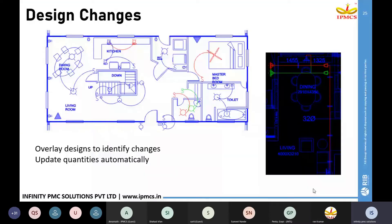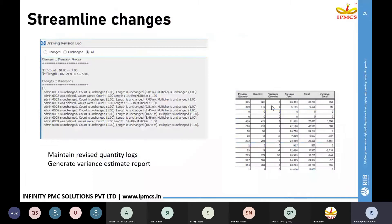You can compare your drawings by overlaying an older drawing onto the newer drawing. You will see a blue line, red line and green line. Green indicates newly added elements. Red indicates deleted elements compared to the older drawing. Blue indicates lines or elements that remain unchanged in both drawings. This is how you compare drawings for quantity takeoff. Once quantity takeoff is done with the updated drawing, you can maintain a revision log showing what elements have been revised, how many counts, and what lengths have changed — and generate a variance estimate report with previous quantity, present quantity, and variance.